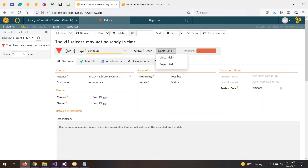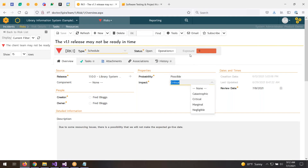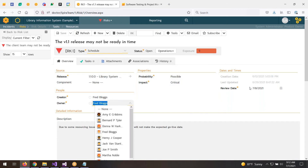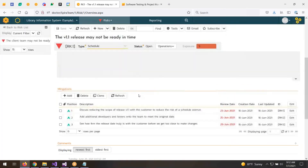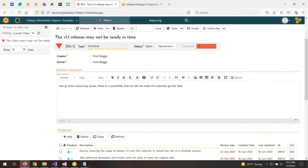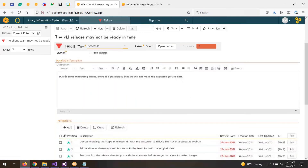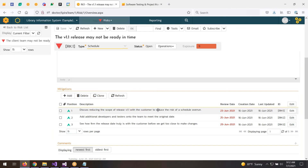From these values we choose the probability and the critical impact, which are used to calculate the exposure. We assign the risk to a person who is considered the owner and can assign a review date. We can also add custom fields to customize the risk form. The description field takes rich text — you can put in comments, pictures, images, tables, and lists.